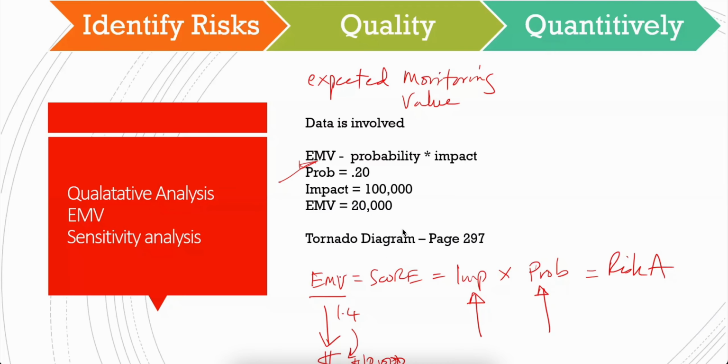Let's say you're doing your budget, and you aggregate all your costs, and you can add to that your EMV cost also. That's your total budget. This is all your costs, i equal to 1 through n, all your aggregated costs for all the components in the deliverables, equipment, laptop, phone, whatever, all the costs of all resources, people, plus the EMV, the cost of your risk.